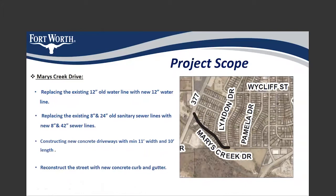Now let us talk about the proposed improvements on each street separately. On Nearest Creek, we are going to replace the 12-inch old waterline with a new 12-inch waterline. We are also replacing the existing 8-inch and 24-inch sanitary sewer line with new 8-inch and 42-inch sewer line. After that, we are going to construct new concrete driveways with a minimum 11-foot width and 10-foot length. At the end, we are reconstructing the street with new concrete curb and gutter.